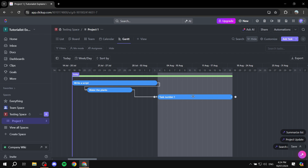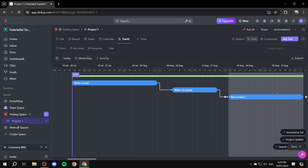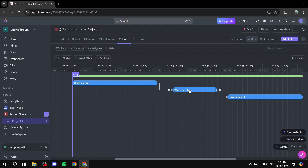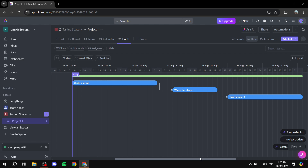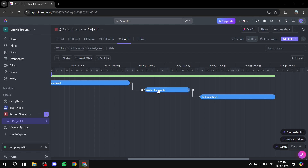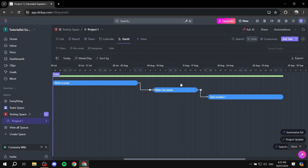It's going to be a lot easier to see the connections between tasks. You can see the relationships — so 'blocking': it's blocking the one in front of it, and 'waiting on' the one behind it. So watering the plants is blocking task number one, because watering the plants needs to be done in order for task number one to be done. And it is waiting on the 'writing a script' task to be complete before we can finish it.